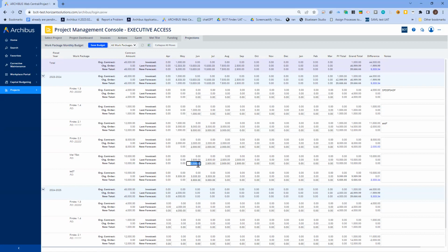Everything's balancing there. And then again, as invoices are logged through the process where you guys approve them, Common's team puts them into the system, they're going to populate in here. And month by month, as you pass a month, as Mel mentioned, they'll become locked down. You won't be able to change them. And as mentioned, if you have invoice amounts, they're going to come down and replace what your projected amount is, because an invoice in our case is a simple way of identifying actuals in your project. That, in a bit of a whirlwind, in 36 minutes, is the two changes that we're introducing.